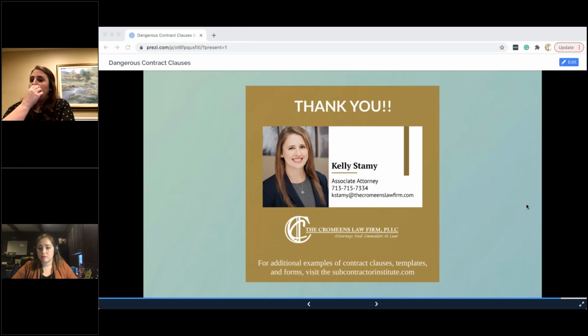That feels wildly unfair. And there's a difference between what is legal and what is unfair. And so, my recommendation in that situation is you do it, you eat the cost to prevent any sort of delay damages. You try to get through it as fast as possible and you minimize that, and then you turn around and sue for misrepresentation, or there's a variety of other causes of action that we might be able to go back against the client for in that situation.